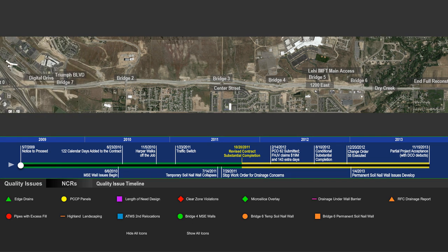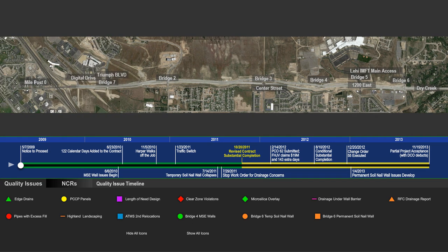So it was just a long east-west highway that had a number of construction problems. The issue was that it took too long, so there was a construction delay, and the work was of such poor quality that it required some concessions or reductions in the price paid, and it resulted in a roadway structure that wouldn't last as long as anticipated. So quite a number of issues are related to that.